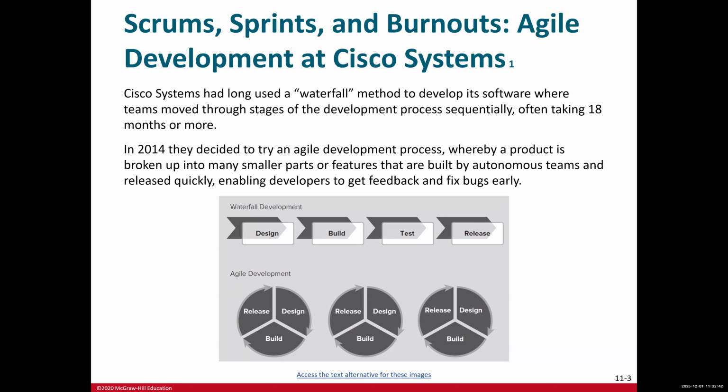Since teams are working in shorter cycles, they can adjust quickly based on the feedback they receive from the customer or even from the market. If something is not working, it can be fixed immediately rather than after months and months of development, waiting for the product to be released, and then gathering feedback, by which time the product could even be obsolete.